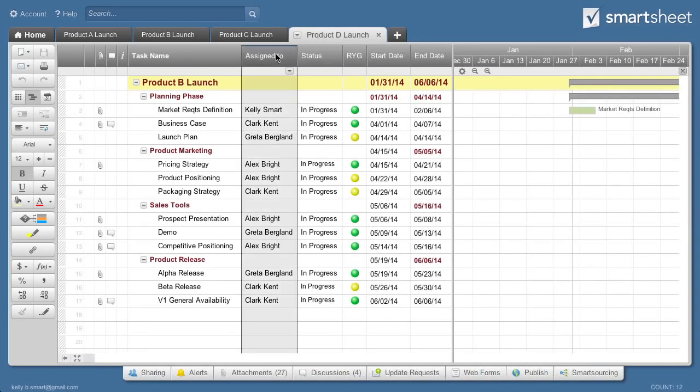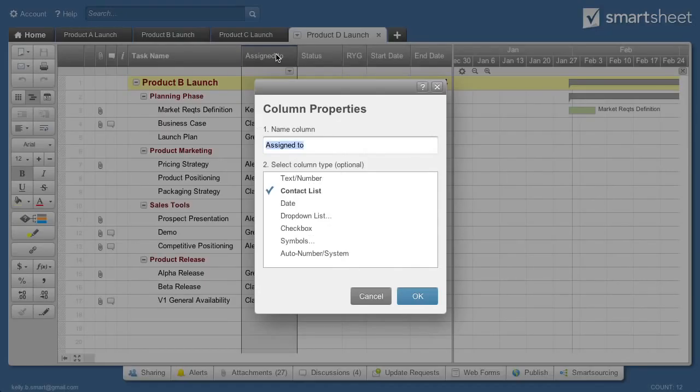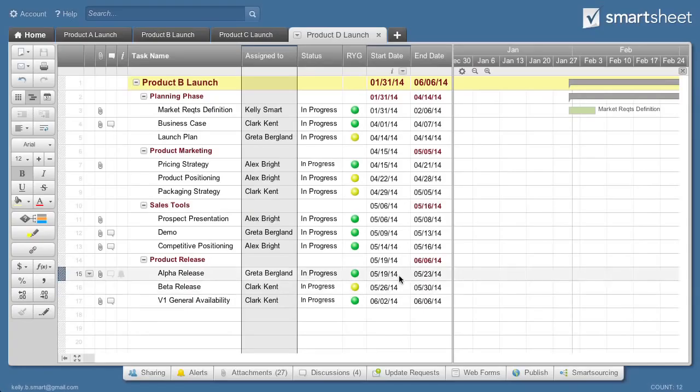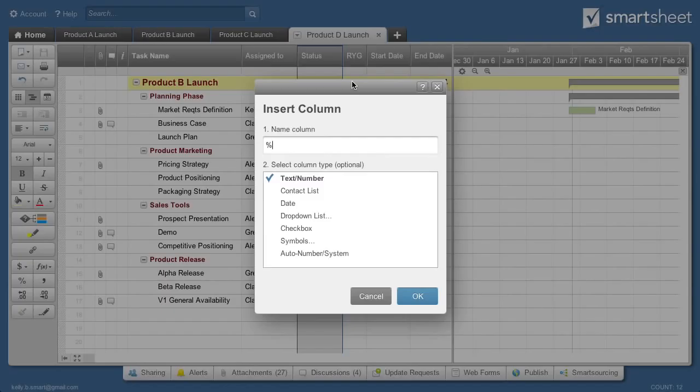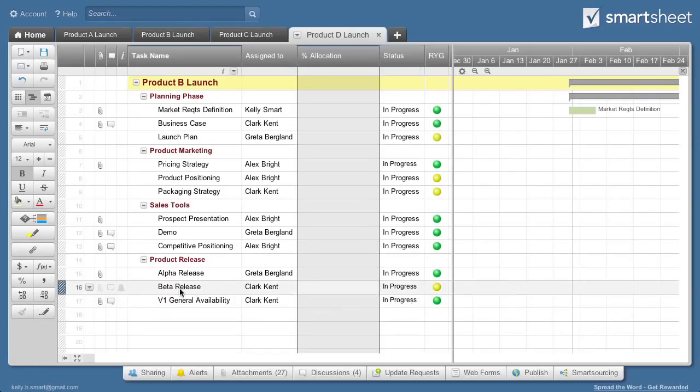First, make sure your Assigned To column is set up as a Contact List column so you can assign users to tasks. If you're working with resources who are partially allocated to multiple tasks or projects, you'll want to add an Allocation Percent column to your sheet. Format this column as a percentage.